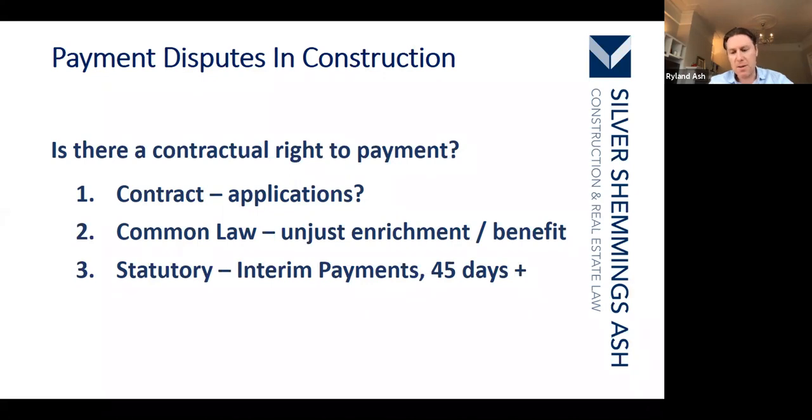So you can find yourself being bound by terms and conditions just because they've been shot back to you at the 11th hour before the works began, and you haven't signed anything, but ultimately you'll be bound by those terms and conditions because they were the last shot. So I always say, do the opposite as you would do to maintain a healthy marriage or relationship. Try not to have the last word in your relationships, but in terms of contract formation, always have the last word.